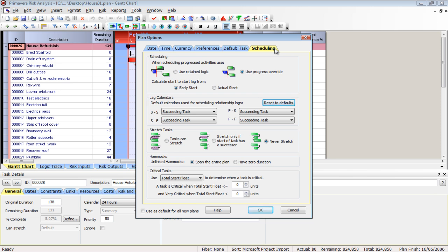Now, you really shouldn't have issues with this because it does pick up the import options from other scheduling tools. So when it imports a Microsoft Project file, it knows the settings. When you hit F9 in Primavera P6, it sees what options you used. So you really shouldn't have any problems with this, but it is good to make sure that nothing came out of line, because sometimes maybe you changed a setting and you hadn't hit F9 again yet and things didn't reschedule. There could be all sorts of issues here. It's good to come in and make sure everything is scheduling as you want it to.